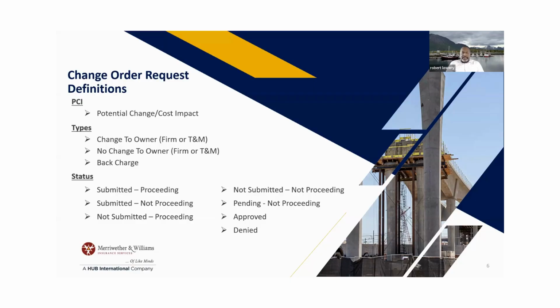So when they do a not to exceed time and material, you're going to have to track that on daily tickets. Any material that you had, the guys that you have out there, and how many hours they work, all that needs to be tracked on a daily basis for that change order. And you want to make sure that you're getting the superintendent or whoever it is to sign off on this. So you don't want to leave that site that day without a signature, because you want to be able to say, hey, are these numbers right? Do you agree to it? That's the important part with time and materials. It's tracking on the daily, get it approved daily.